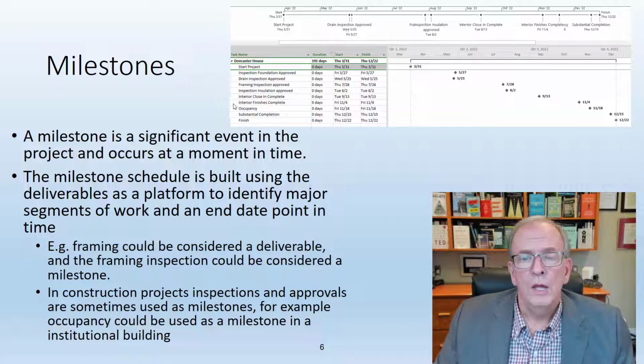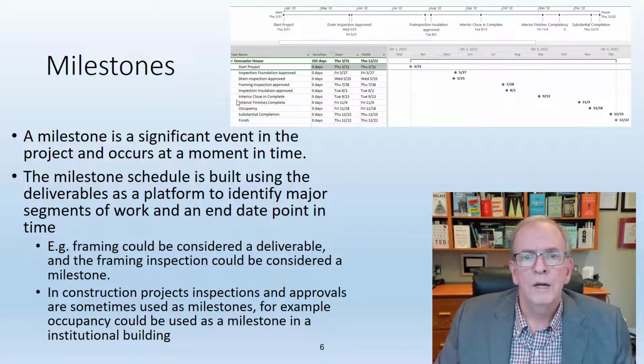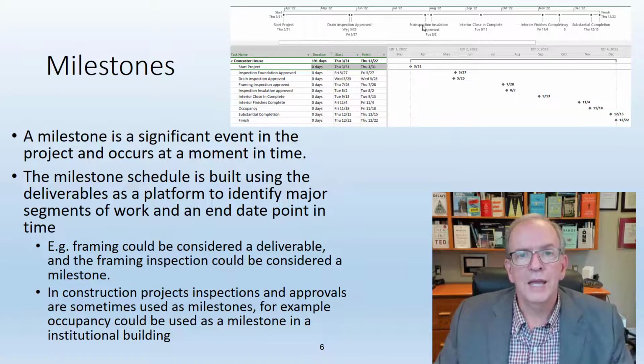Milestones. Well, if we've got the deliverables kind of hammered out, then we want to have a good understanding of milestones. What are we driving towards? What are some key dates that we're trying to match up to? And have we got them defined? And then we can look at that. And they're usually somewhat spaced out so that they're not like every single day or something like that. They're maybe spaced out depending on the length of your project, every 6 weeks or every 3 months.